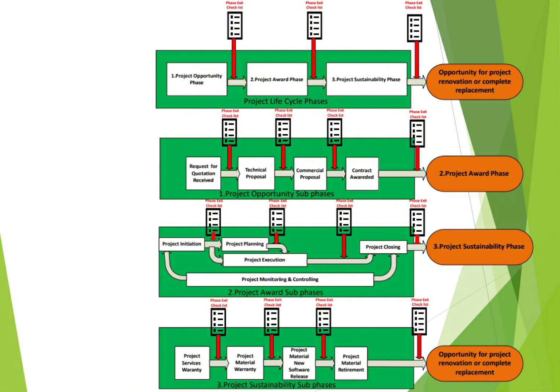And also, if the payment terms call for the customer to open an LC, letter of credit, to finance this project, you need to ensure that this LC is opened by your customer and you have it before proceeding with the execution of the project.